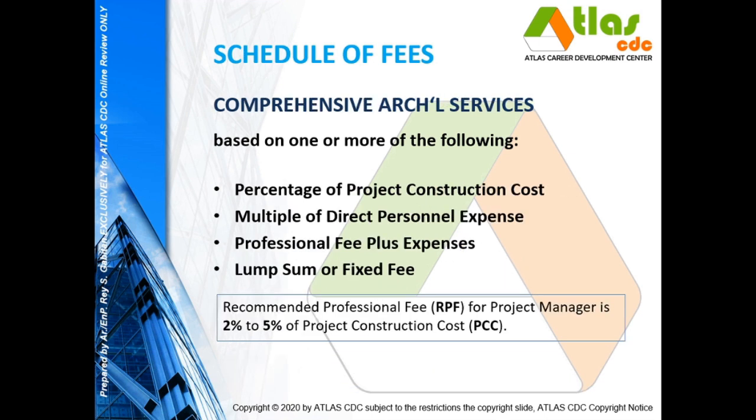For comprehensive architectural services, this is document 206. You can employ these methods: the percentage, the MDPE, PF plus expenses, or the lump sum or the fixed fee, and the recommended professional fee for project manager is 2% to 5% of the project construction cost.